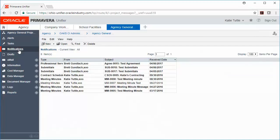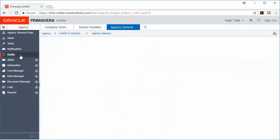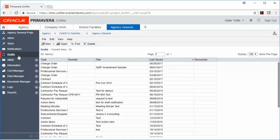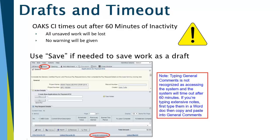Next, let's click on Drafts. Drafts are any unfinished records that you have created and saved for later. And if you no longer need them, you can delete them out of your list. One quick note about drafts and timeout is the system will timeout after 60 minutes of inactivity, and all of your unsaved work will be lost, and there is also no warning given. So please use that Save button at the top of your record and click that often to make sure that all of your work has been saved.